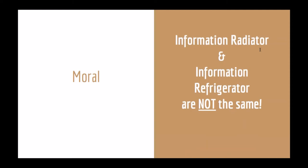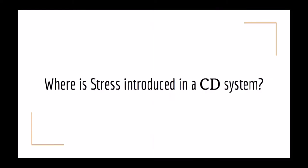The moral is that an information radiator and an information refrigerator are not the same. This plays a greater role when you come to stress in CD systems. The information radiator is the ideal thing you want in your system, not the information refrigerator. Also, an information radiator may not always be electronic — it can be a physical scrum board on the wall. As long as people are using stickies and it is available to anybody in the office, it is an information radiator. The moment you say 'use only Jira and anyone who wants to know anything must log in,' it becomes an information refrigerator. Information refrigerators are good for audits and retrospectives, but not for real-time information.